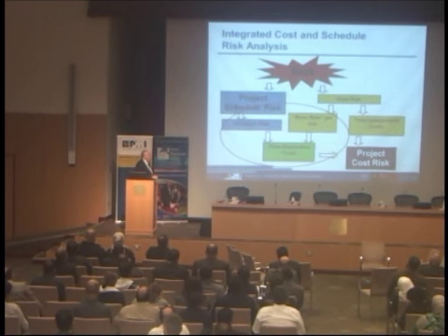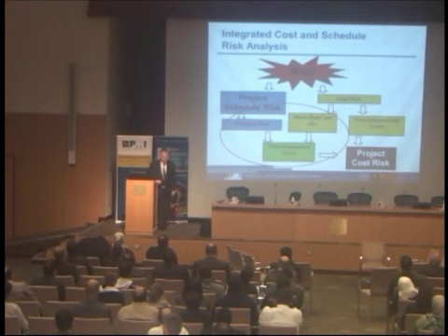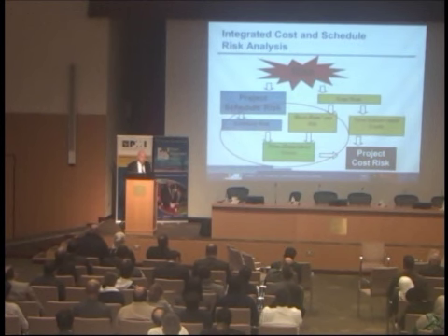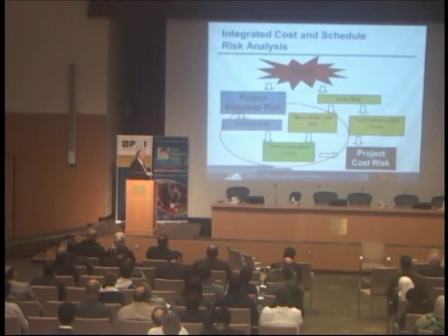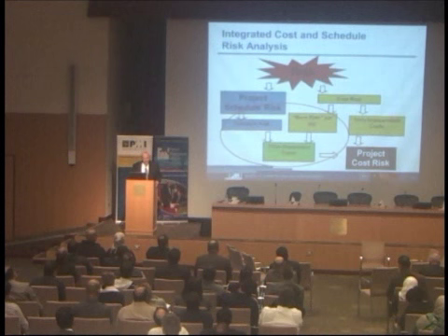You've got time-independent costs that may be uncertain, but not because of time, and the two of them drive into project cost risk results. So all of a sudden, we realize that integration of cost and schedule risk is going to give us a cost risk result that has the proper component, because it's dealing with the type of resource, the proper component of schedule risk affecting the duration of activities and therefore the use of time-dependent resources.